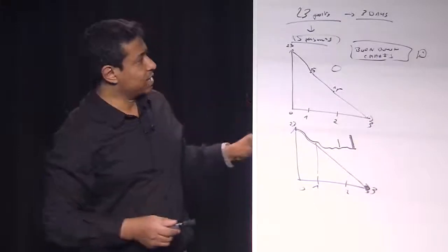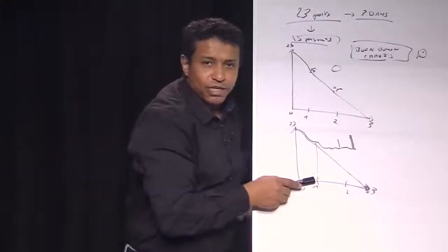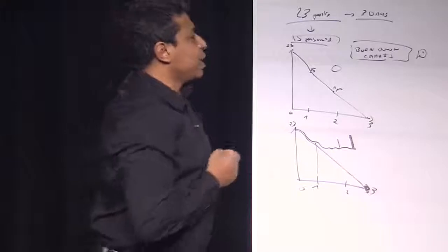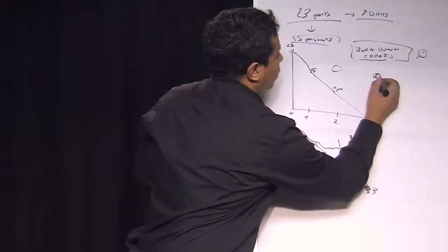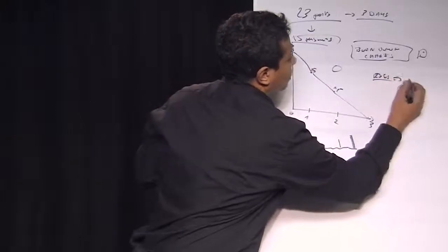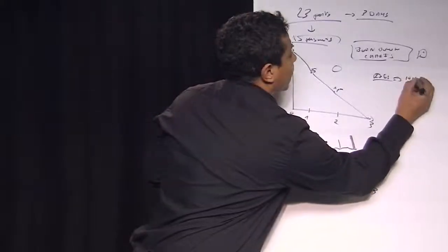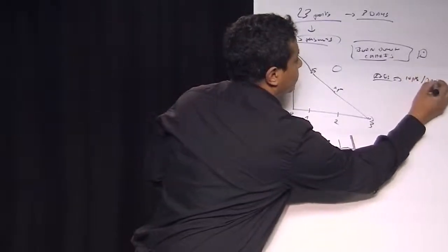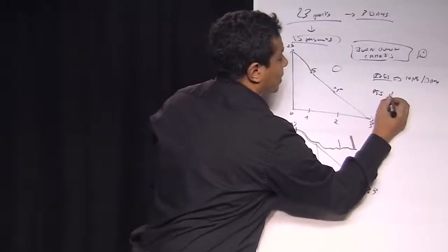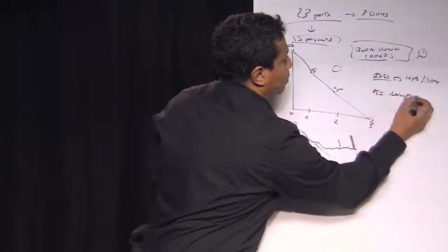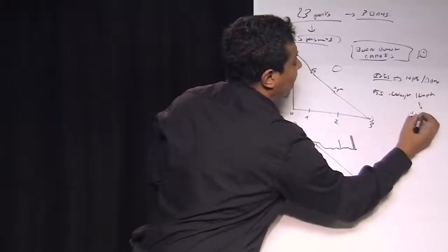Now, let's go back, and this is the reason why we need the velocity. Why? If I know my team can charge, my devs can charge a velocity of, let's say, 10 points a day, it means that if I have a project that weighs, let's say, 100 points, I know it can be done in 10 days.